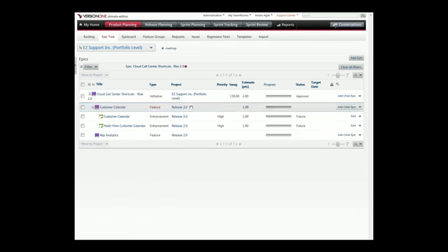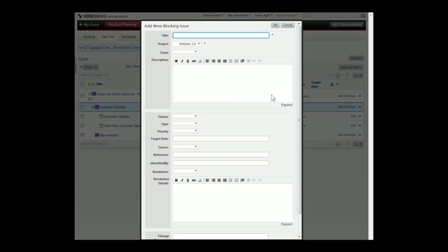The other thing that Mike mentioned as part of this breakdown process is capturing of the risks and creating those spike stories. And he said that was one of the key takeaways he wanted everyone to have from his discussion. So I wanted to show you how you can do that in version 1. If you want to capture a risk, then you can go and create on the feature a blocking issue. So go create a new issue.